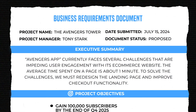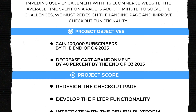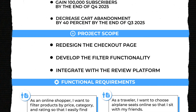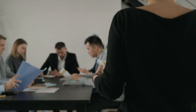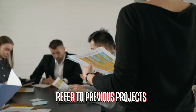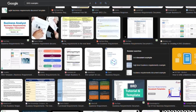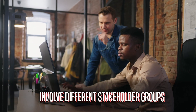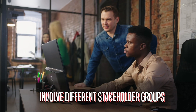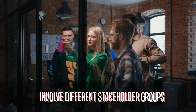Making a business requirements document takes a lot of work, but here are a few tips on how to write an award-winning BRD. A good way to approach any tech documentation is to refer to previous projects and learn from past experience — using an example or template instead of writing everything from scratch will save you tons of time. As you gather information — the fancy name for this process is requirements elicitation — involve different stakeholder groups. It will help you look at the project from several angles and get fresh ideas. Some ways to elicit requirements are brainstorming sessions, interviews, observations, workshops, and surveys.